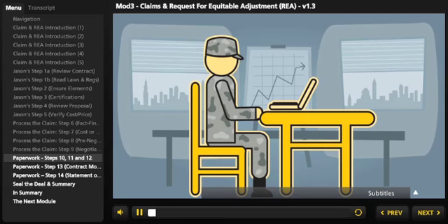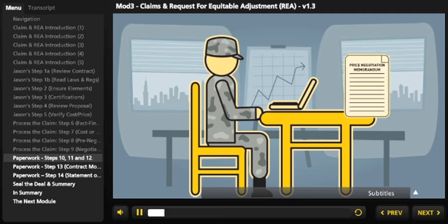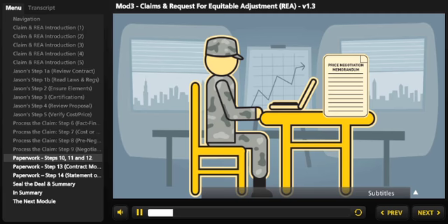Jason then accomplishes the large part of the paperwork, including a price negotiation memorandum, a determinations and findings, a contracting officer's decision. Jason's contracting officer's decision includes all the requirements at FAR 33.211.